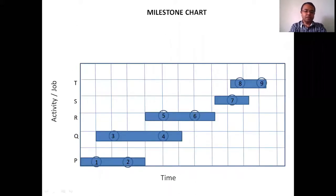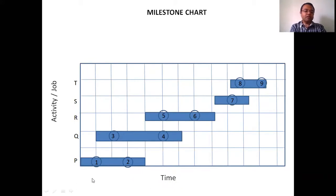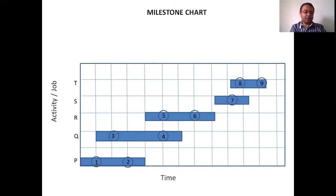For example, for the P activity requiring a total of 4 days, we divide those 4 days into 2 parts. To complete the second task, you must first complete the first task — then only you can go for the second task. So the total activity is subdivided into 2 parts and we provide one milestone for that.